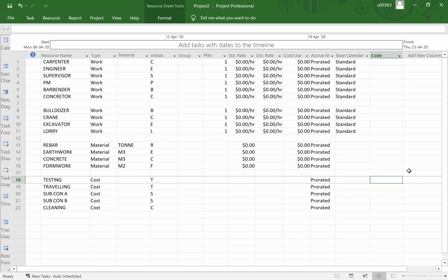The contract document does not split into machinery, manpower, and material. That's why in Malaysia I found it very difficult if you split those things into manpower and machinery. People in the United States, for instance, use a lot of hourly rates. Their wage, their salary, everything is tied up with the hourly rate. So it is easier for them: once they input the hourly rate, at the end of the day they will get the payment. But our payment system is quite different. So that is the issue.